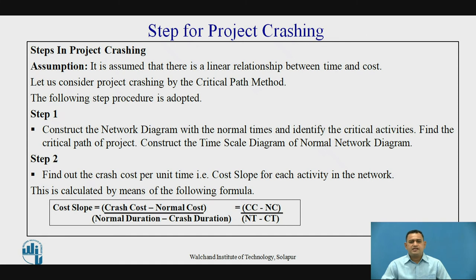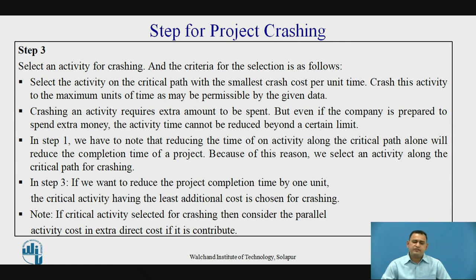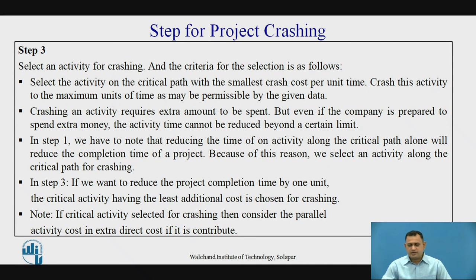Step 2: find out the crash cost per unit time — that is the cost slope of each activity in the network diagram — calculated using the formula: Cost Slope = (Crash Cost − Normal Cost) / (Normal Duration − Crash Duration). Step 3: once we get the cost slope of each activity, select the activity with the lowest cost slope per unit time. Reducing the duration of an activity means assigning extra resources, which means extra expenditure. Keep in mind the activity can only be crashed up to its crash time — we cannot reduce activity duration below the crash time.